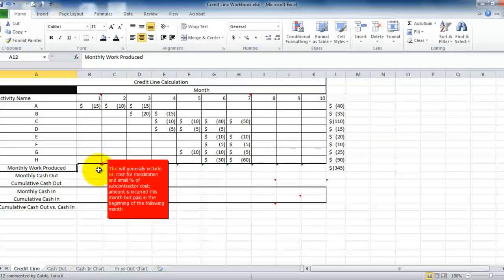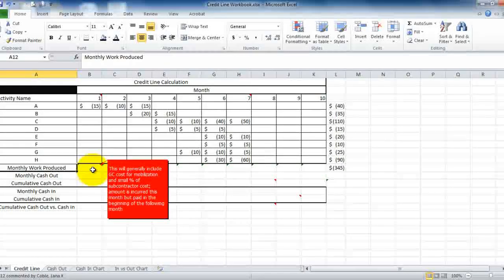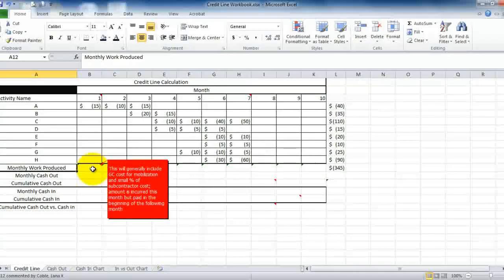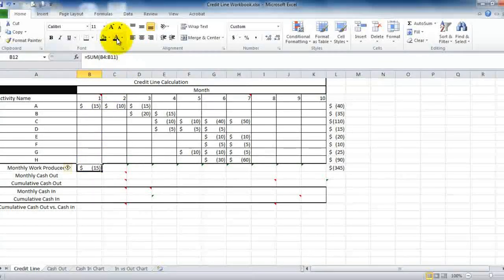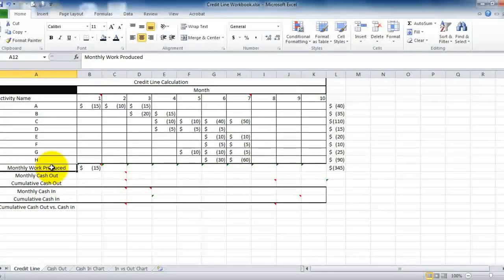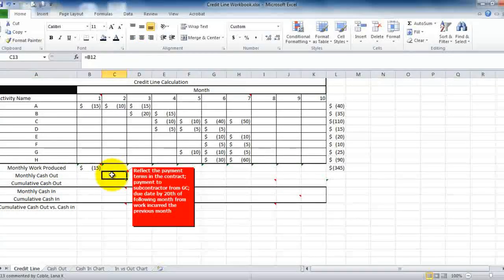You see this row here called monthly work produced. The way that contracting works is, let's say in the first month you've got mobilization charges — a small percentage might be for a subcontractor to perform the work, but you're probably going to have salaried personnel starting the job, renting trailers to create your temporary office, things of this nature. So we want to understand the difference between how much it costs to actually produce the work versus when we actually pay for the work.